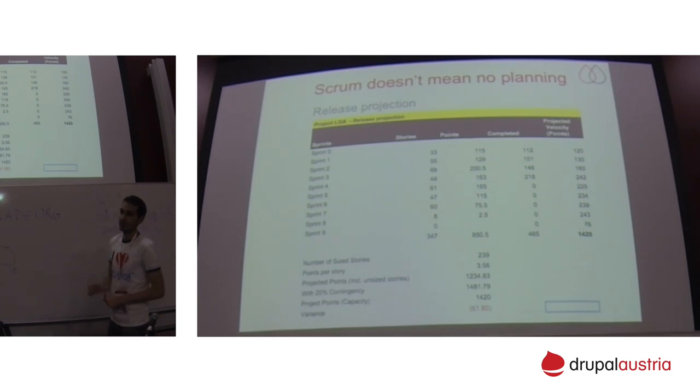Two short questions. How large was that team on that project? And story points were like complexity-based? Yes, all right. About what story points mean, right? And converted, yes. Well, some of the Scrum teams in our company have a real mapping: 1 hour, one story point. Other teams, I know, do it complexity-based, but what we have implemented is more or less a conversion: one story point equals 3-4 hours. I mean, it's not fixed, but more or less you convert that in your head.